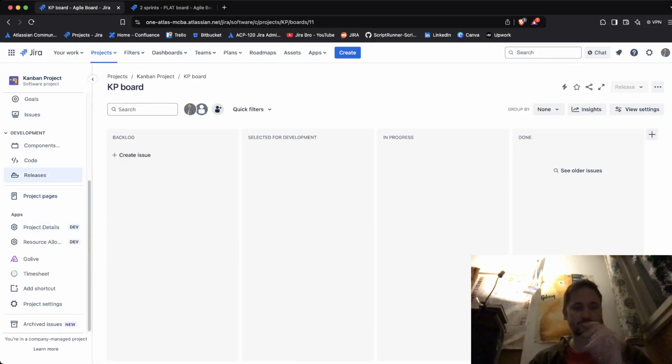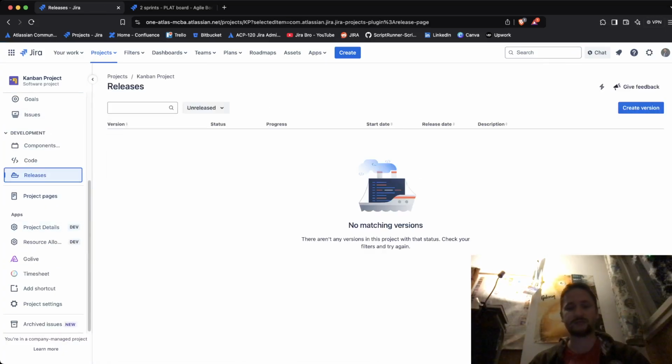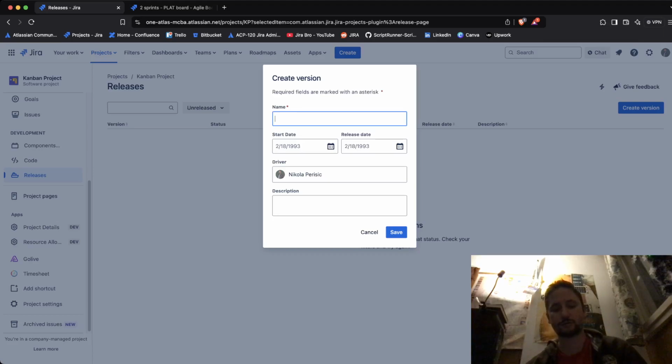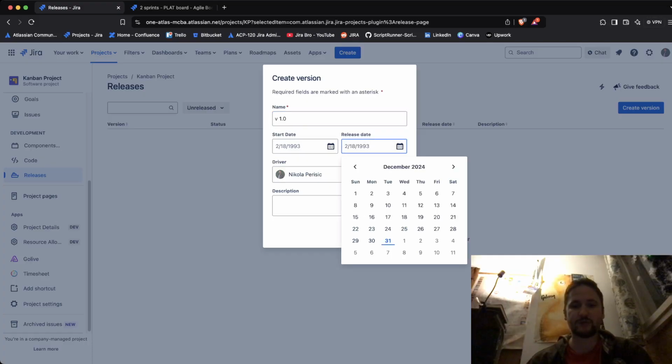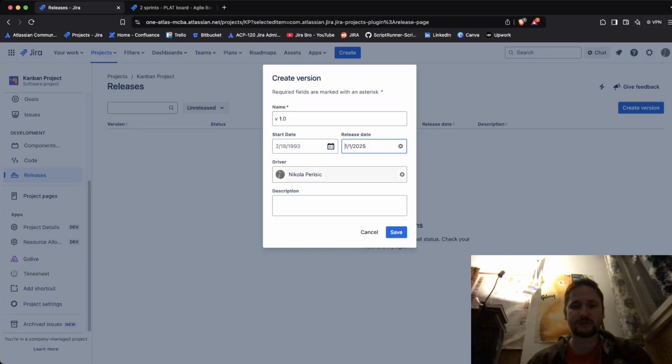Now the question is, what is within the releases themselves? Well, I'm glad that you asked. So in here, I can create my own versions. I'm going to say version 1.0. And it's going to ask me when the release date is going to be. I'm going to say it's going to be on the 1st of January 2025. So that means, since I'm saying the release is going to be tomorrow, then the question is, okay, but what is it today?